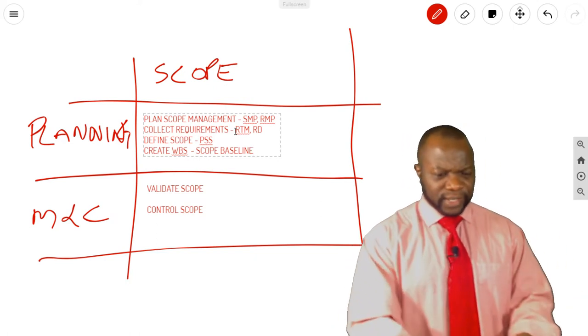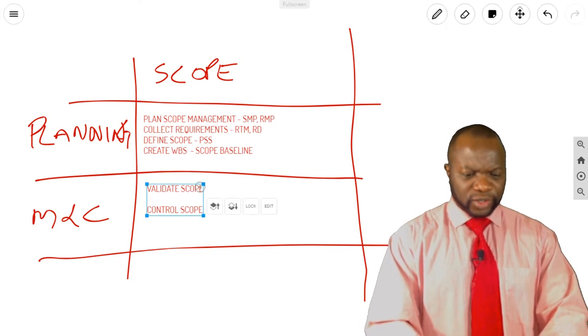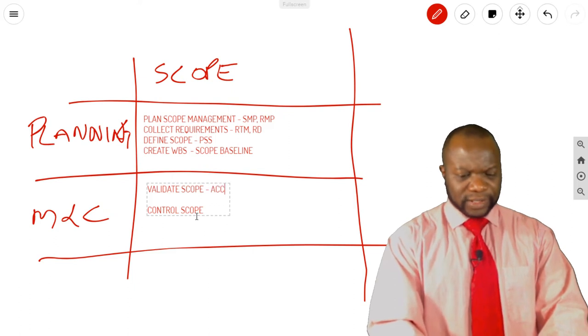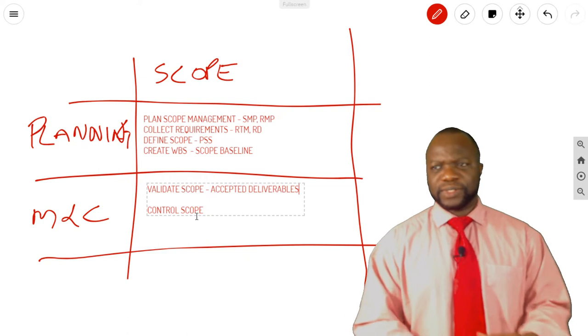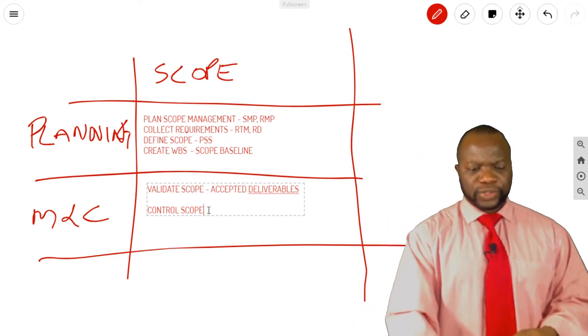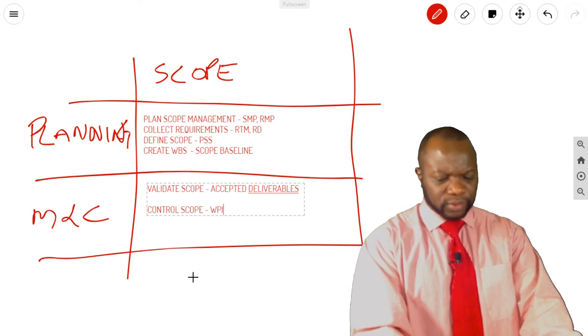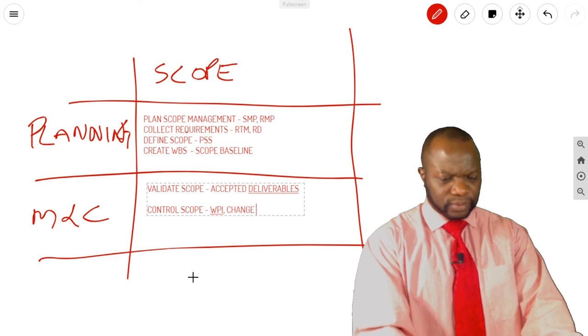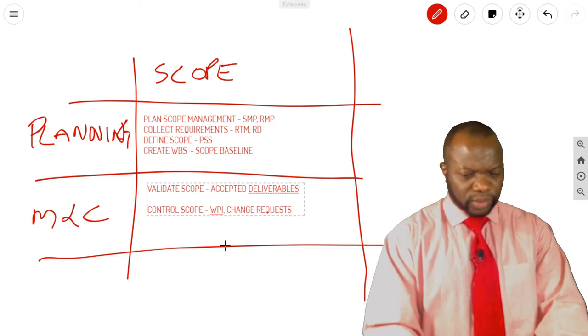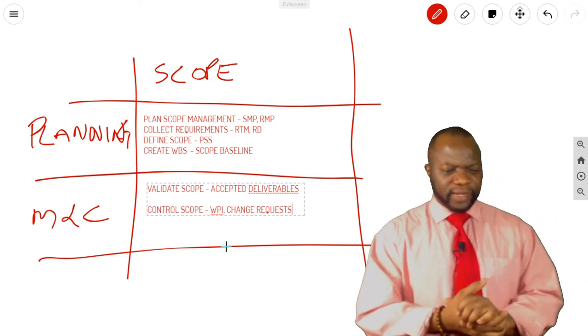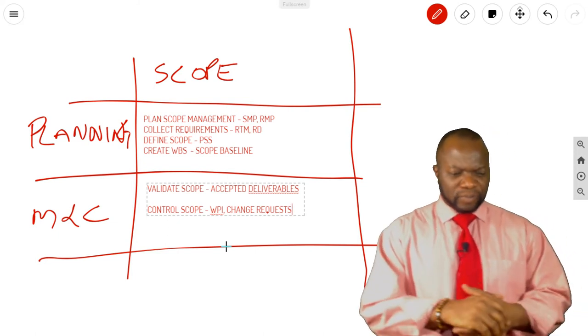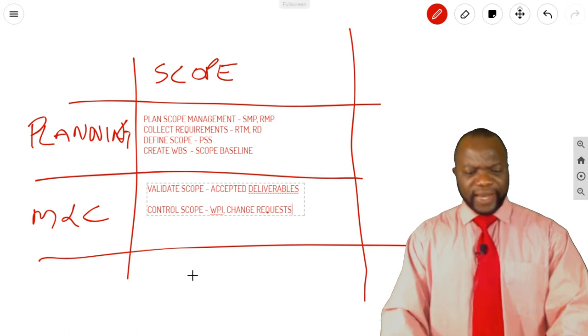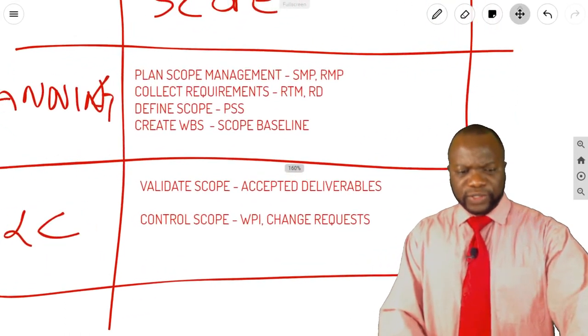Let's go over to Monitoring and Controlling. Validate Scope gives you accepted deliverables when the customer accepts the deliverable. And Control Scope gives you work performance information. It gives you change requests. WPI and change requests. Is there any other thing that you could get from here? Go do some research, find out those recurring themes. But for now, this is what you have for Scope.